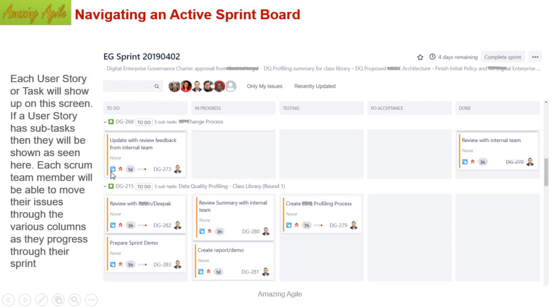That means if I want to manage more carefully or more meaningfully, then I have to create several subtasks for a main story or task. For example, the story is a little software development. Someone will create the design, someone will do the development, someone will do the testing, and then finally it will be delivered. So, assume design, development, and testing. That means I can create three main subtasks, because three different subtasks will be done by three different people. To manage in a better way, I can make three different subtasks like this.